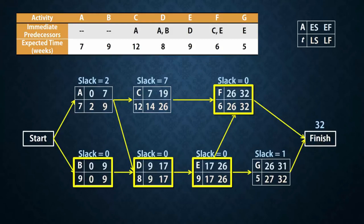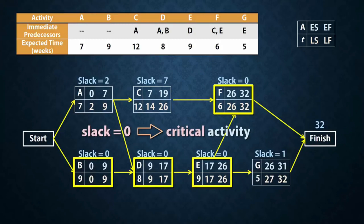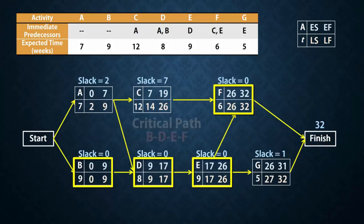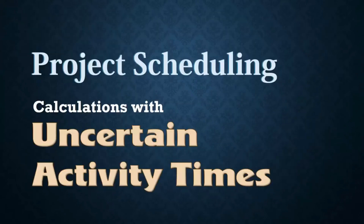The activities with zero slack are called critical activities. And they form the critical path, which is the longest path in the network. So the critical path here is B, D, E, F.